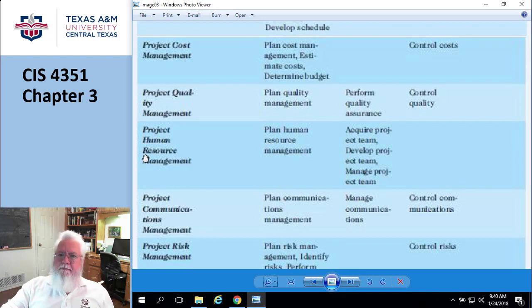So most of the problems with Agile kind of go away if the Agile staff is your own staff. If you have developers on your staff and you're paying their salary anyway, then Agile works really great. However, if I'm hiring a consultant, a third party to come in and do it, and they're doing it with Agile and I don't really know how much it's going to cost, that would kind of freak me out.